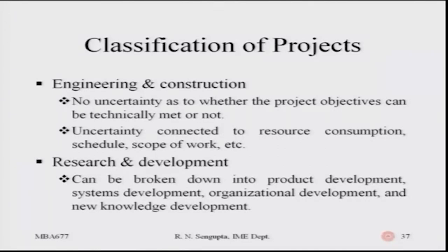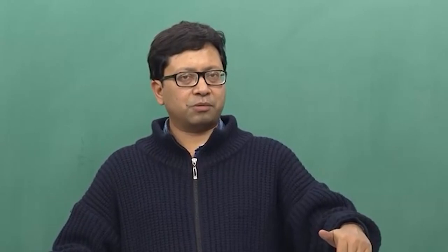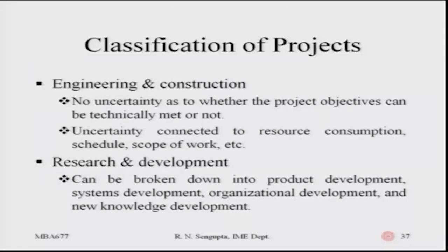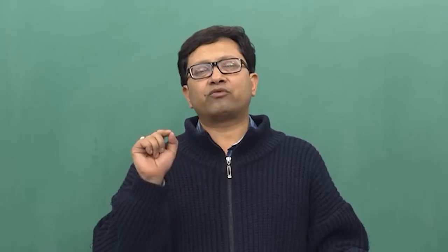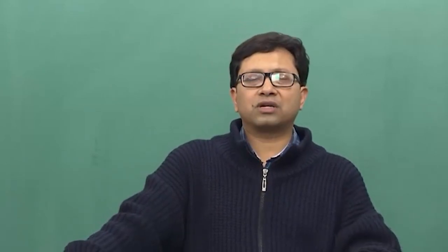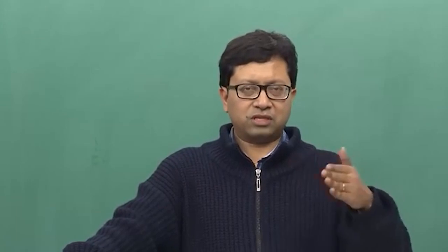Classification from engineering and construction: there should be no uncertainty as to whether the project objectives can be technically met. There should not be any ambiguity. If engineering focus is the main point, technical specifications should be mentioned clearly - no dichotomy in uncertainty connected to resource consumption, schedule, scope, who does what, the plan, engineering specifications, and materials used. Everything should be very specific, because any change would make project implementation difficult. For example, if cement specifications for a bridge are not up to standard, it will affect the long-term life of the bridge.